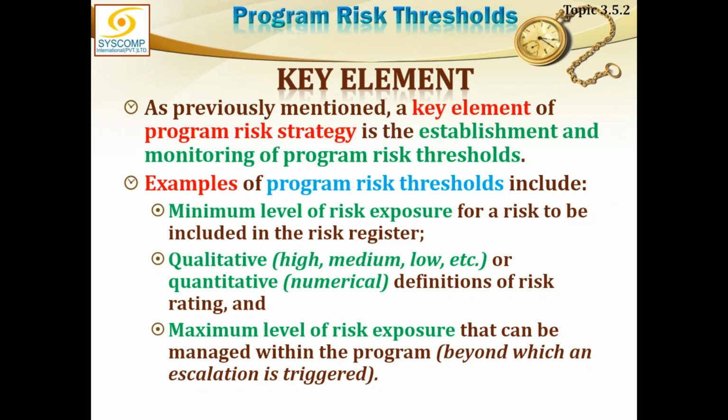Qualitative, high, medium, low, etc., or quantitative numerical definitions of risk rating. How much is the risk rating? Maximum level of risk exposure. What can go worse that can still be managed within the program, beyond which an escalation is triggered.